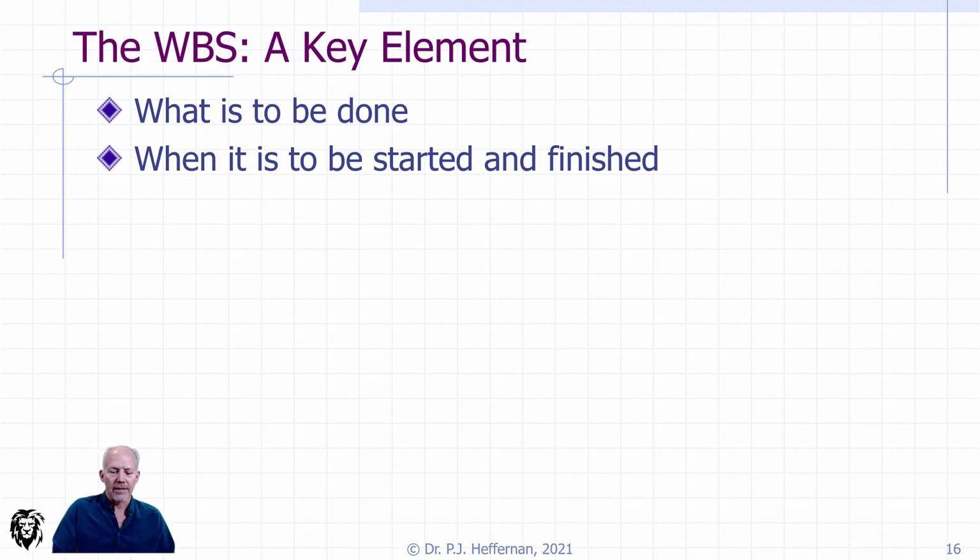Keep in mind, and again we're thinking about the iterations here, they will make a plan based on some choices, which may not be feasible based on the interdependencies of this project, other tasks in this project, or other projects that are interdependent. And so their initial plan may not be the plan that we end up with in the end. So we don't necessarily need to know start and finish at this stage, but we definitely need to know what the duration is based on the method that you're planning to use.